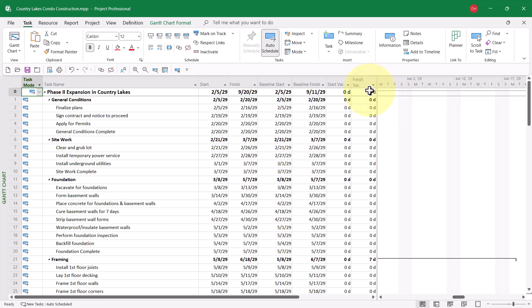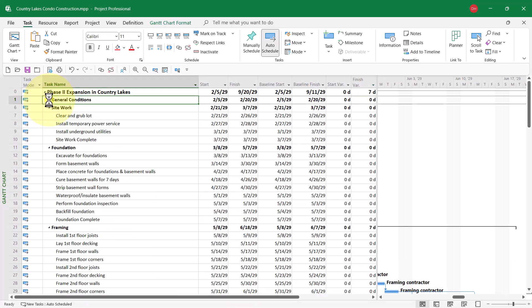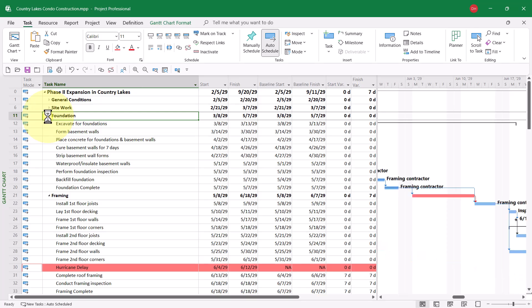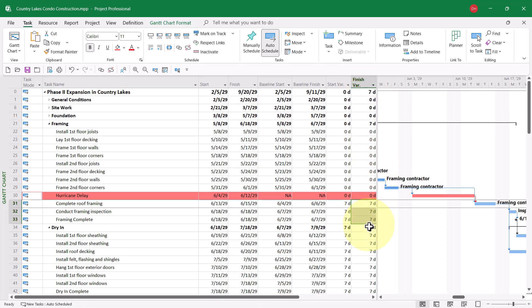Then I need to drag the split bar over to the right edge of the Finish Variance column. In row 0, I can see for the entire project, the Finish Variance is 7 days. Now, let me collapse a couple sections here for tasks that are already completed, and this will let me see the hurricane delay task. I want you to notice that row 0 Finish Variance is 7 days, and all of the tasks below this delay task also show a Finish Variance of 7 days.